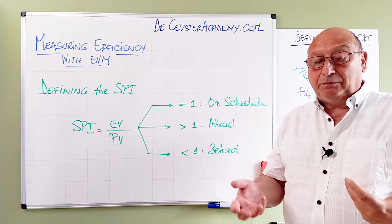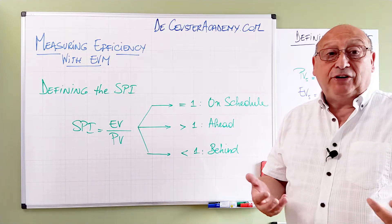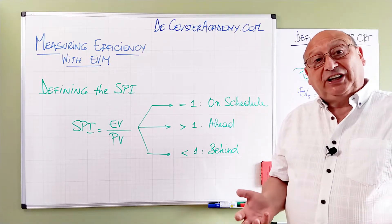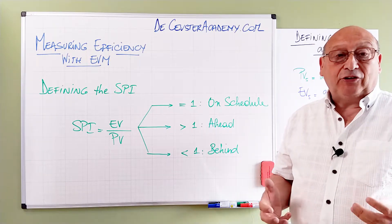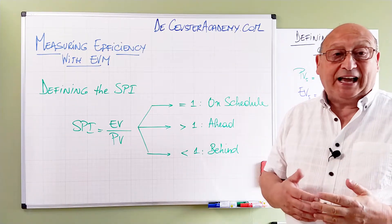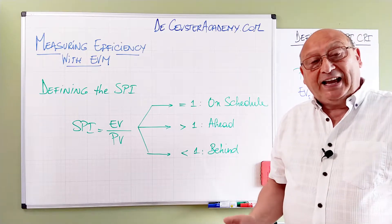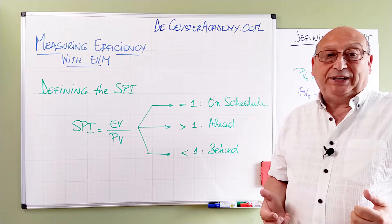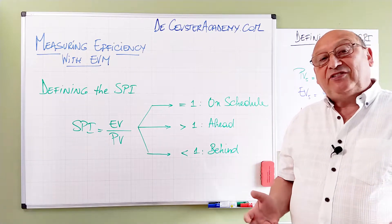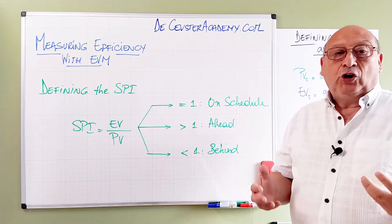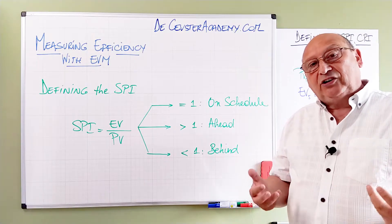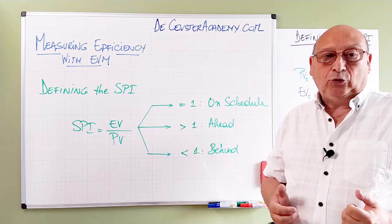When we go faster, it means we are using the funds — we need the money faster and we may run out of budget, even though we are in a good position, and we may be stopped because of budgetary reasons. The last case, smaller than one, means we are creating the deliverables slower than expected, which means the earned value is smaller than the planned value. The SPI becomes smaller than one, which is an indication that we are behind schedule.